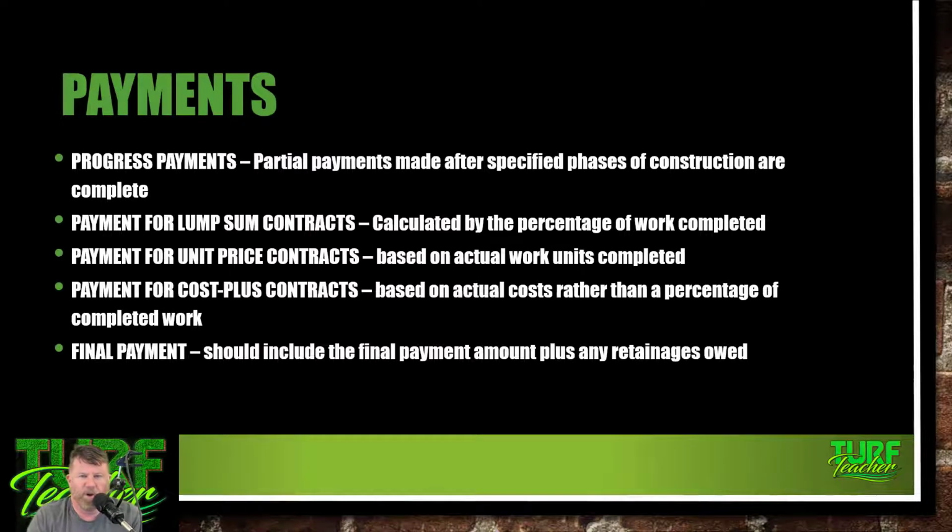But progress payments are partial payments made after specified phases of construction are complete. So you may want to get a down payment. Then you may want to get a partial payment at 50% complete. And then, so many days after final completion, you want to get paid.